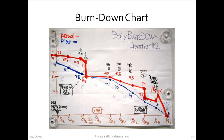The actuals are shown in red. You started with 72 story points rather than 64. At the end of the first iteration you could only complete two and a half, ending with 69.5. At some point there was a huge productivity improvement and the actuals came closer to the plan. This is a typical chart used in Agile methodology, meant to be put up on a wall for high visibility — high visibility being a big principle in Agile — and it's used to monitor a project.